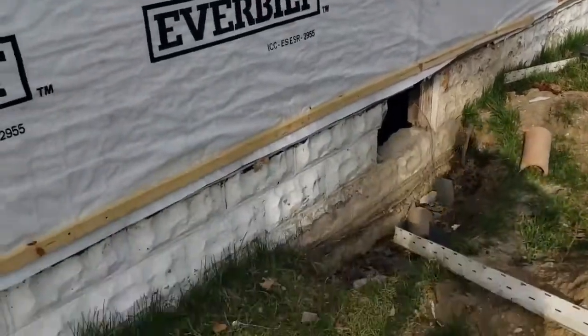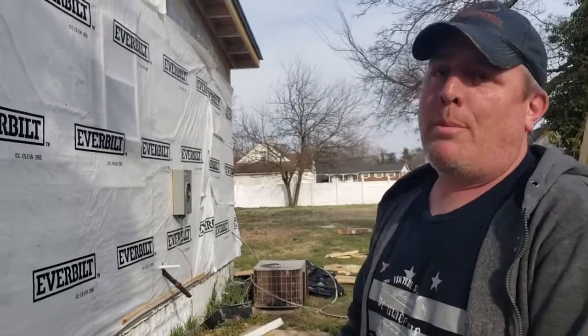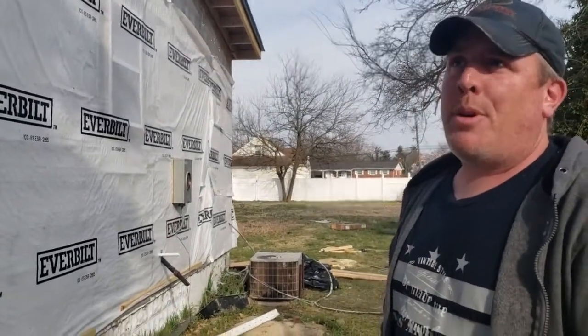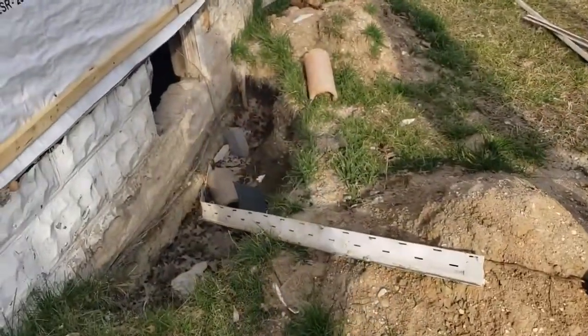Two days after we did it, the inspector comes out, slaps a red sticker on the property, tells everyone to vacate, and made us go back and repull plumbing, electrical, mechanical before he released us to work on the property. It was a waste of 36 days. Unbelievable.